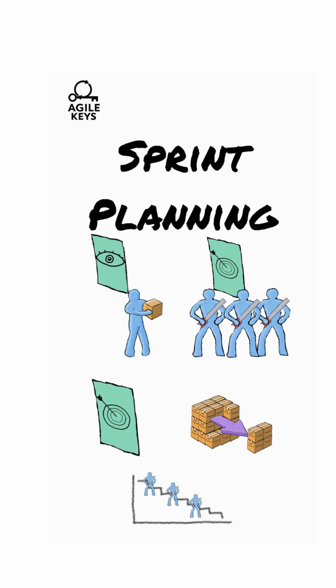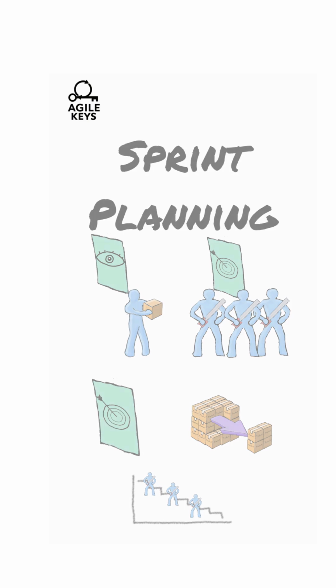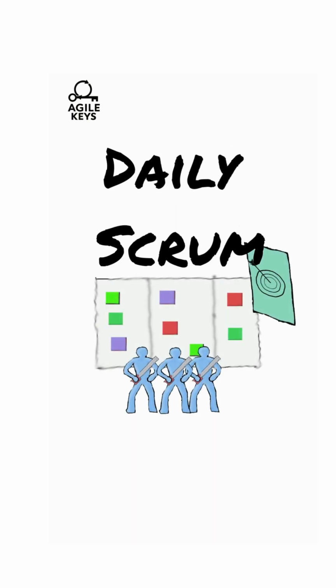That's known as the sprint backlog, a real-time visible plan of the work to be done. Every day in the sprint, the team meets up to check whether they're still on target with regards to their sprint goal and change their plan if not. This is the daily Scrum.